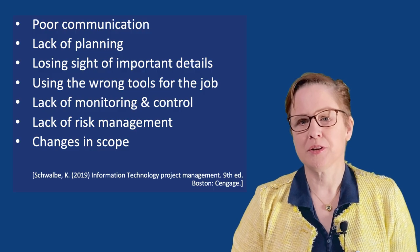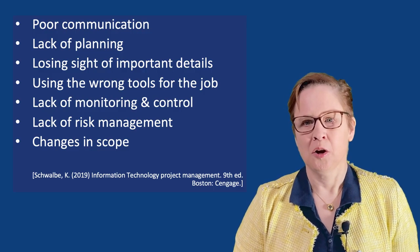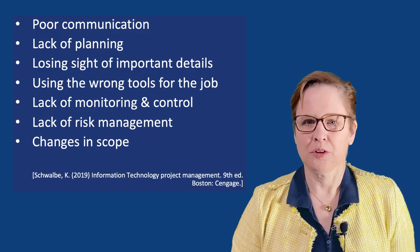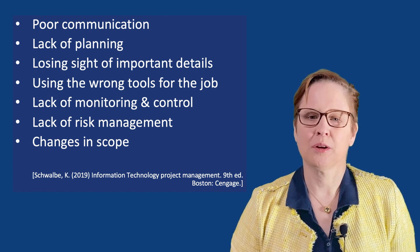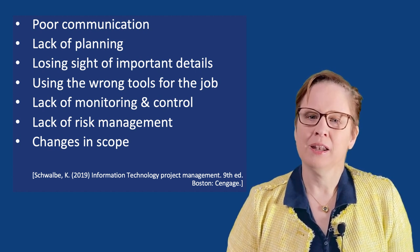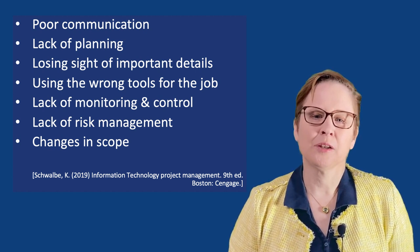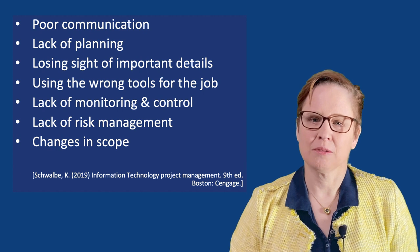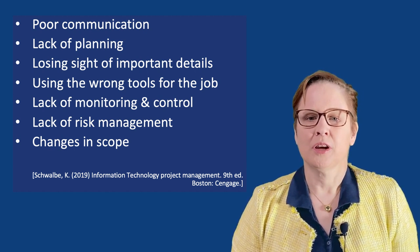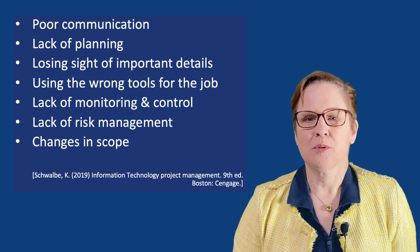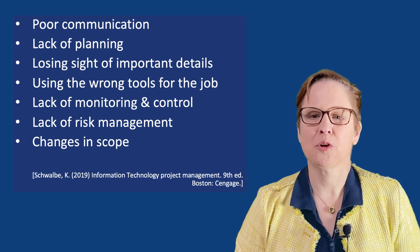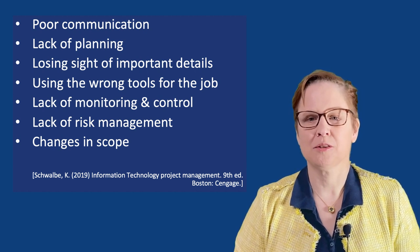Projects often fail for several reasons. Poor communication, such as not interacting within the team or including all stakeholders. Lack of planning, such as not taking dependencies between deliverables into account. Losing sight of important details — an example of this was a ship that was too tall to go under the bridge next to the shipyard.